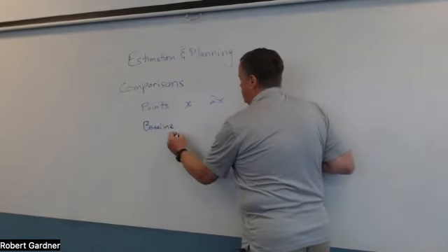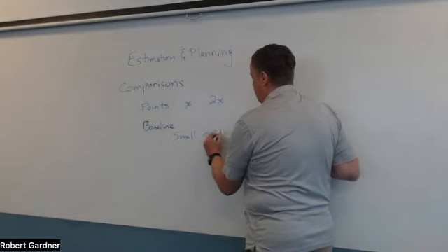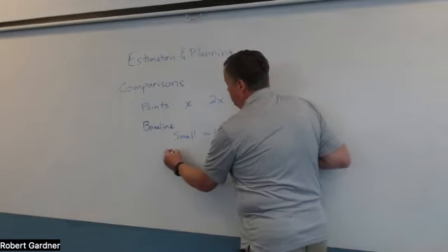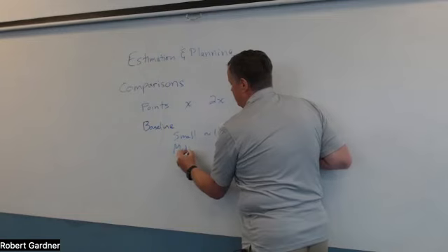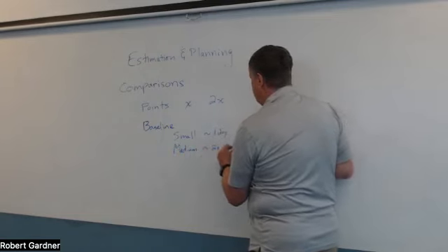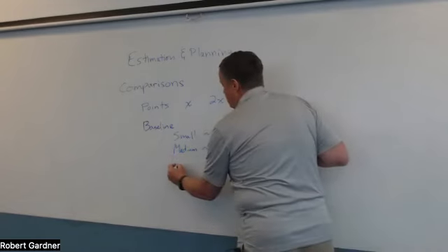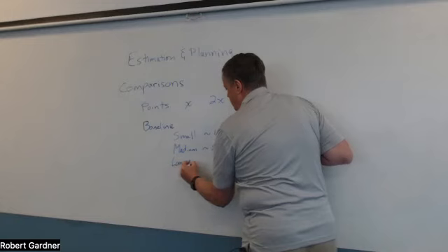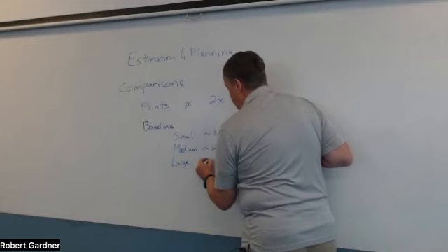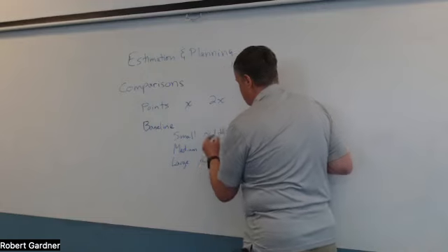You pick a small one that took about a day, and then a medium, which you try to get to be twice the small. So maybe a couple of days. And then you get a large, which will be about a week. So that one that took about 5 days, 5 times the 1.